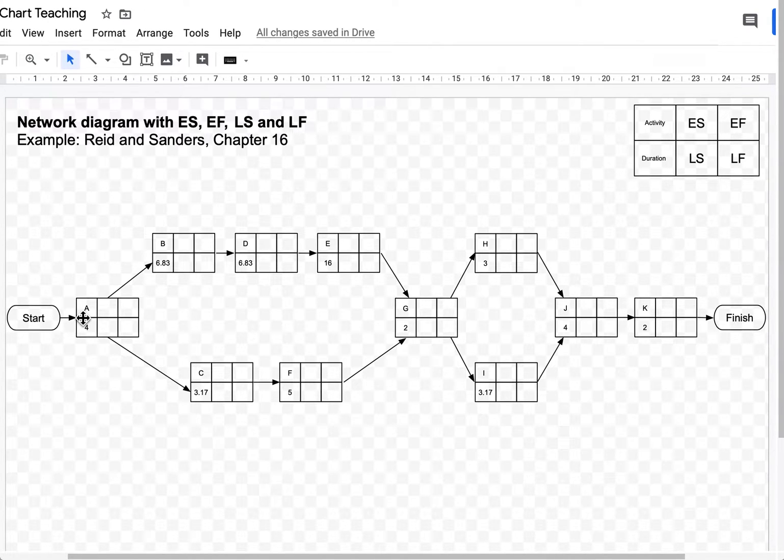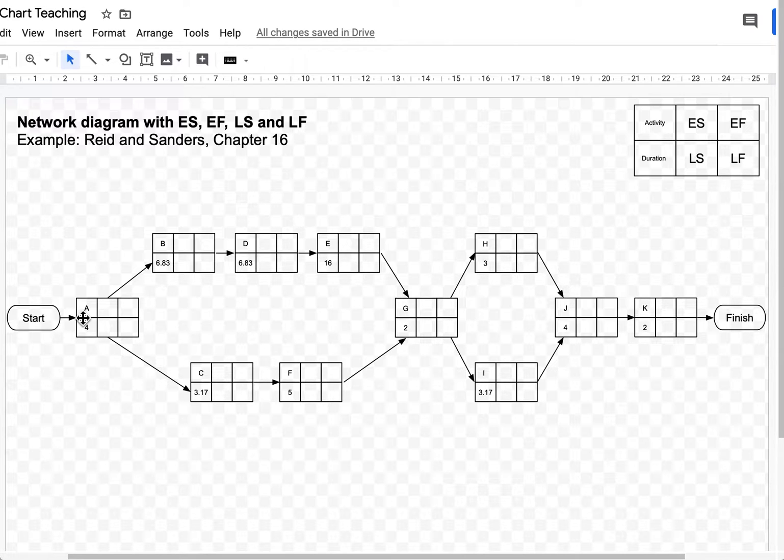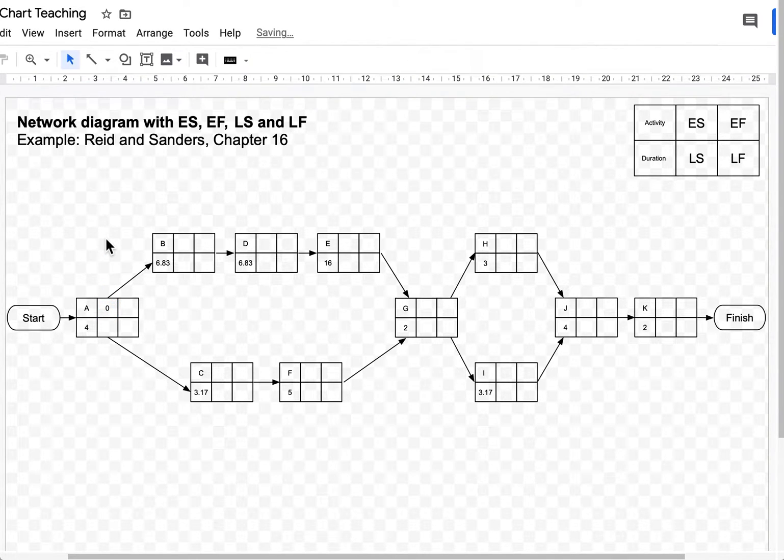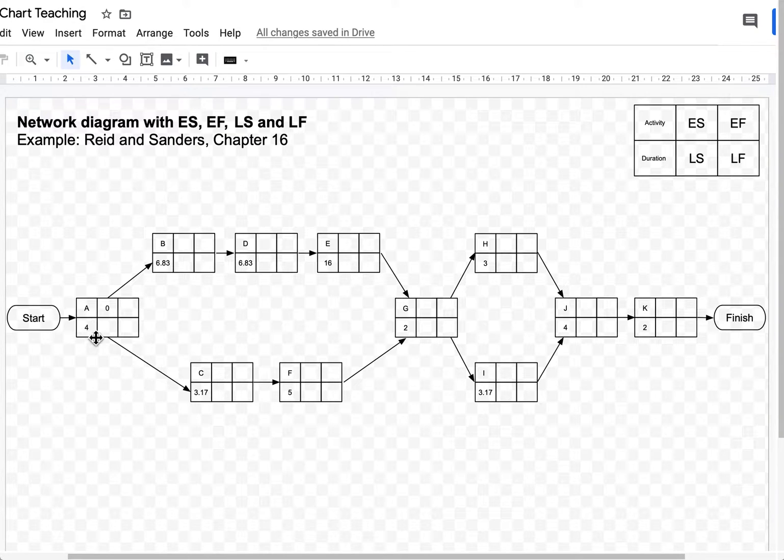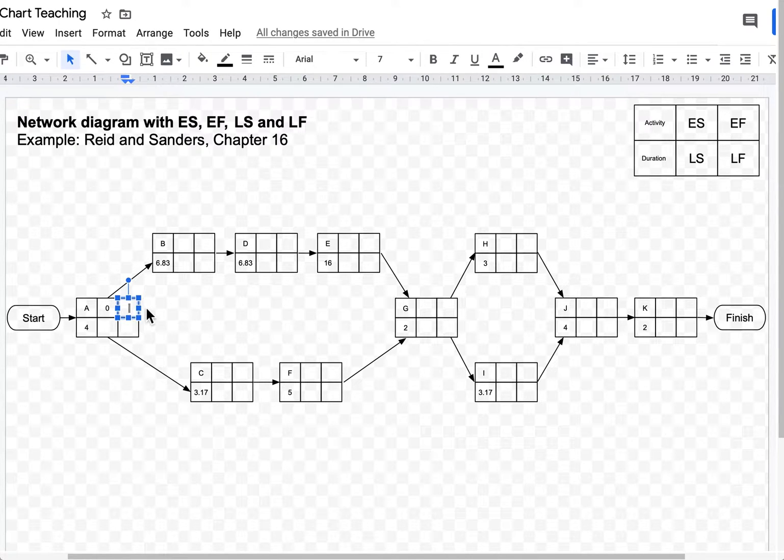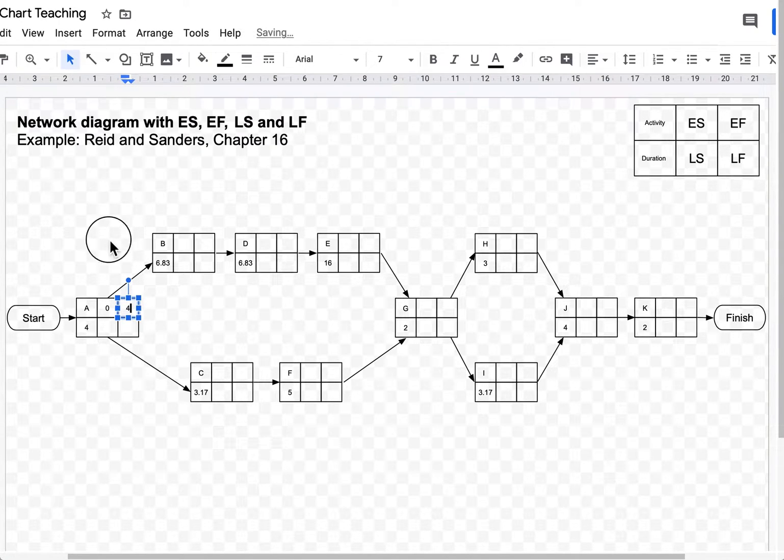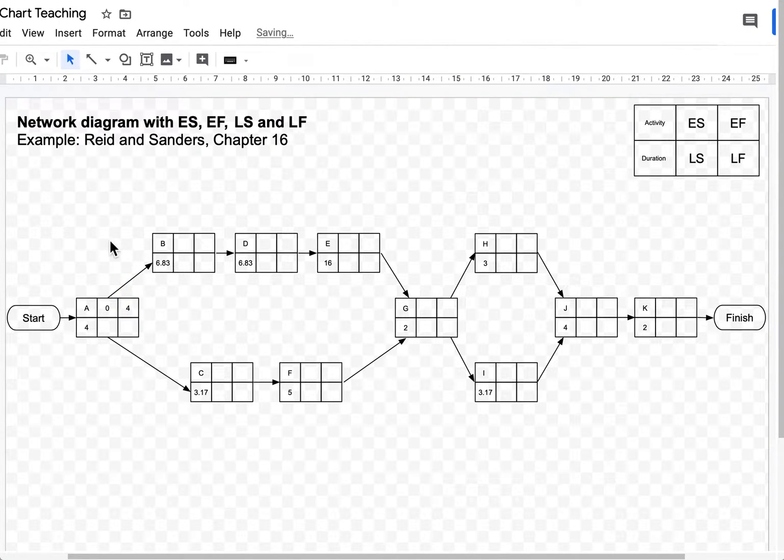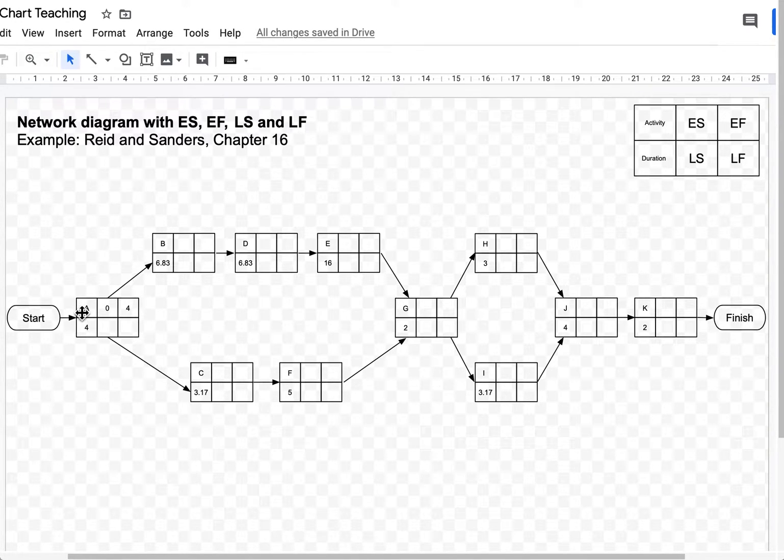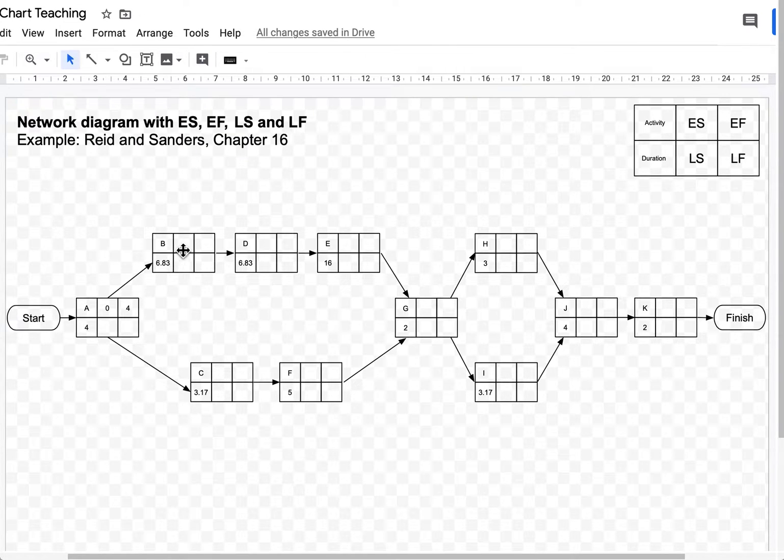By convention we always assume that every project, the first activity starts in time 0. So I'm going to write 0 over there. Now I also know that activity A takes 4 weeks to be completed. So if I add up 0 plus 4, that's 4 weeks and that's my earliest finish time. So I finished activity A in week 4.